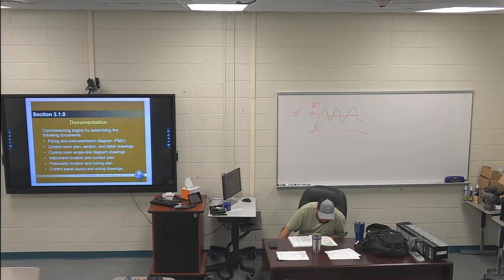First paragraph, last 2 sentences are highlighted. Of course, the system will not be accepted without tangible and well-documented proof that everything works as specified. Warranties hinge upon good documentation as well, so this step requires as much paperwork as it does process and testing.